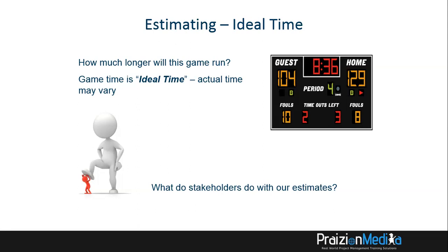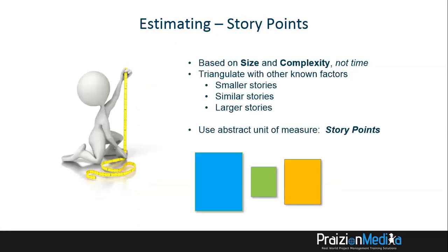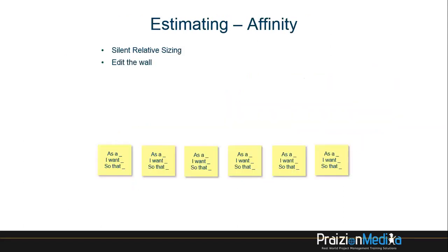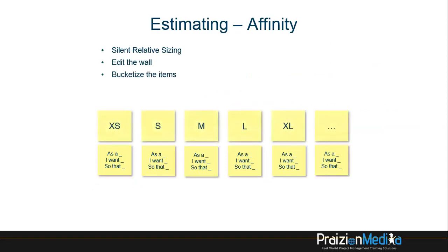So what I'm saying is consider learning a little bit more about Agile. In the world of Agile, we use empirical data. We start off with the concept of triangulation. We build on that by using things like planning poker or what we call affinity estimating. It's a very quick, rapid way of estimating using t-shirt sizing. You could convert these at the end of the day into actual story points.